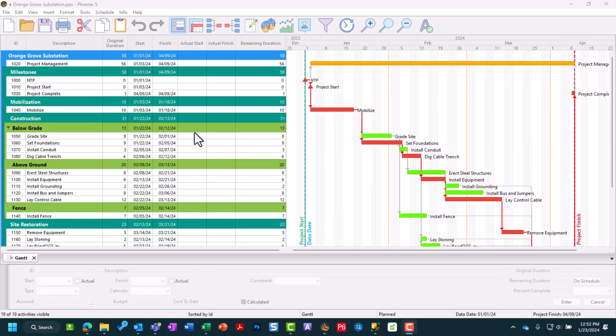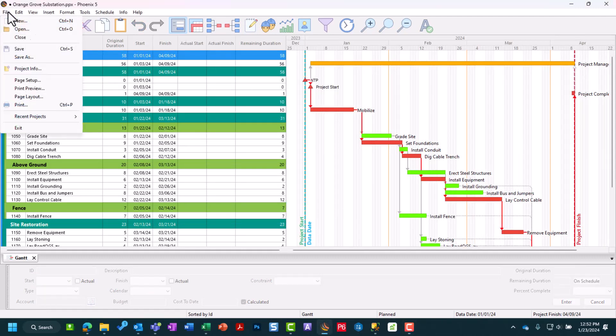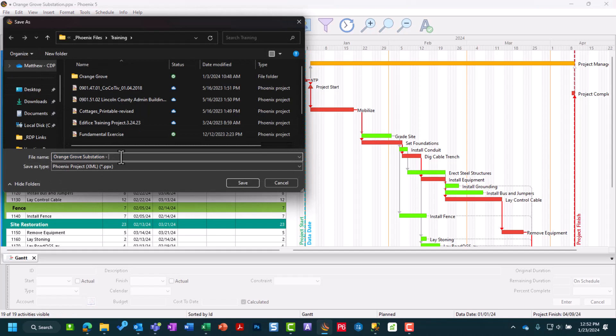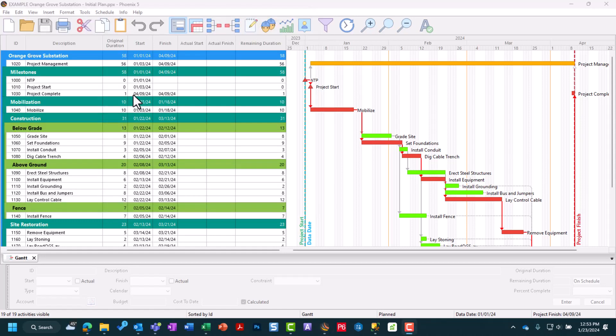The backup project in Phoenix starts in your File menu, Save As. When you're doing your Save As, you want to make sure that you initial it and give it an appropriate name that describes your backup. For us, this is going to be our initial plan before we get into any of our future update periods.